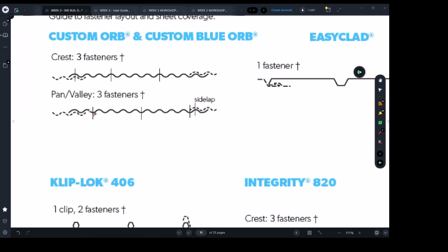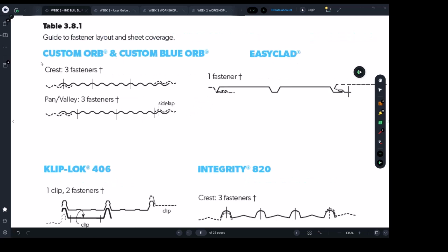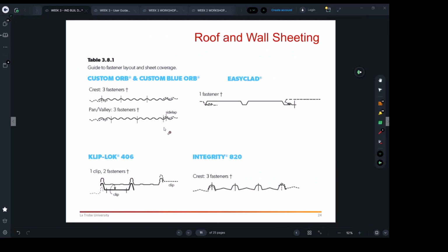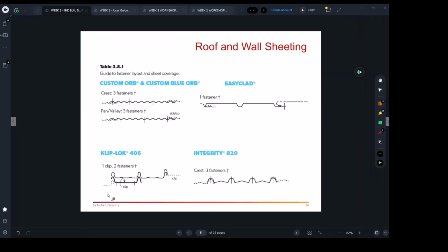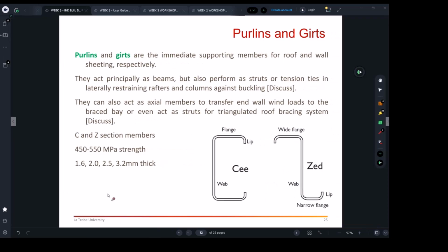Yeah, they're telling you what to do and what not to do. And it really varies from one product to another. Basically they use very lightweight tools to put the screwing in, but they have to be within acceptable quality, because all those screwings, they've got special screws that are waterproof, obviously, and they've got some type of rubber below the head of the screw. So it's a really well-known practice in the industry, but again, selecting the material has to be ticked off and checked by the construction managers to make sure qualities are on top.